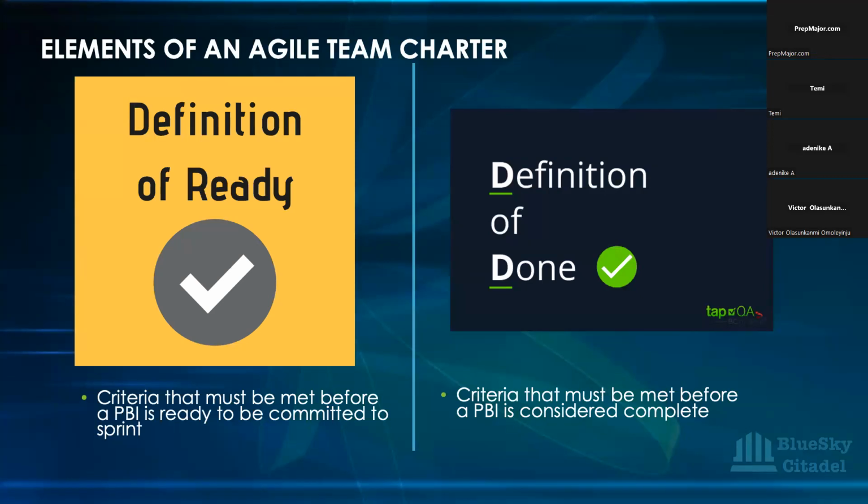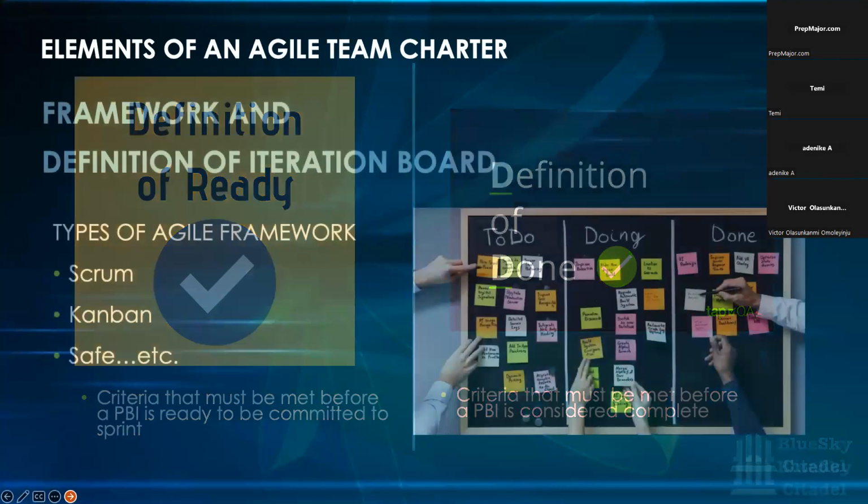And then there's definition of done, that it could be like acceptance criteria and criteria tests are fulfilled. The developers have developed the features, unit testing has been done, it has been integrated with other increments and it is working fine. The products have been tested, there's been regression testing, and there's no showstopper bugs, and the features are ready to be tested by the users, and it is also shippable and can be demonstrated to the customer. I mean, there's so many. Just think about it as a team and define these criteria. And there is the next one, which is the framework.